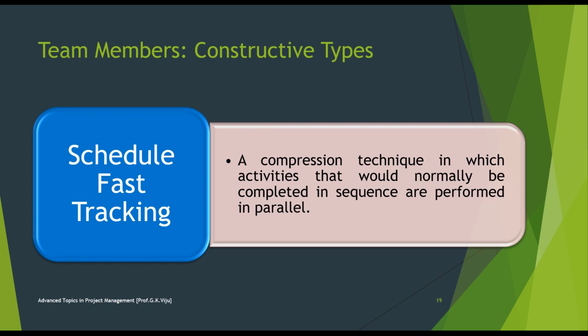You will not review the activities on the non-critical path, as they have float. Reducing the duration of those activities will not affect the schedule; it will only give more float to them. You should monitor the other paths whose durations are close to the critical path. If any other path becomes critical, you will reduce the duration of the new critical path. In this case, your current path will no longer be critical. Afterwards, you will rearrange the fast-tracked activities and reanalyze the schedule. To compress the schedule, project managers start with fast tracking because it does not cost more. However, it increases risk as activities are overlapping.